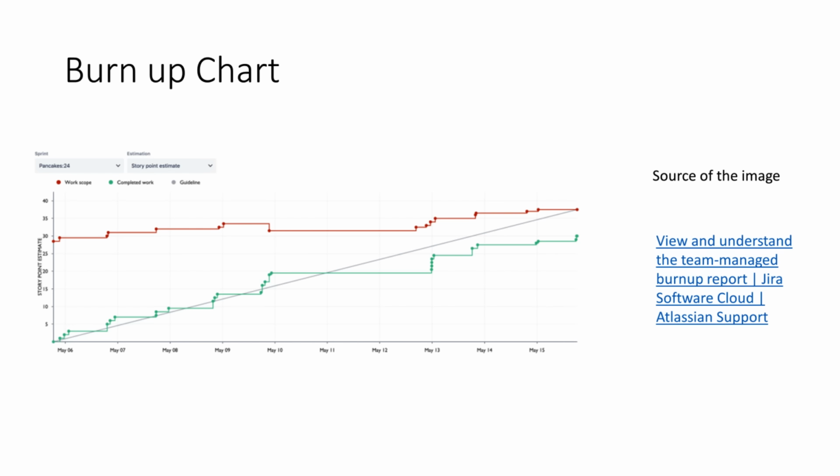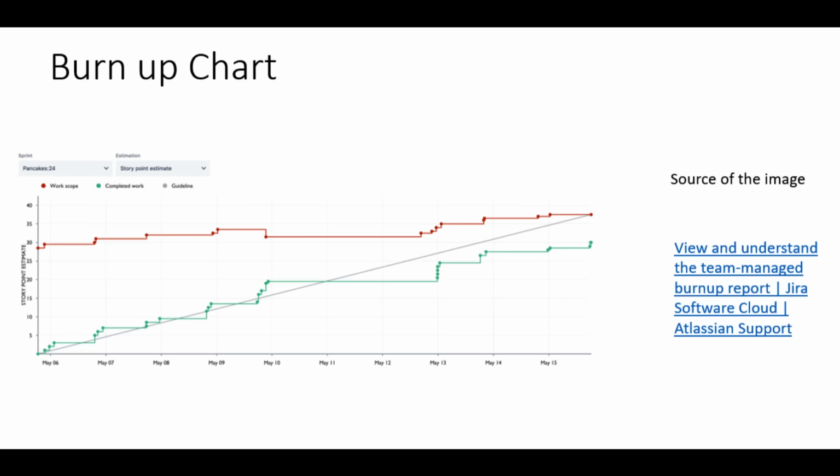Burn-up chart. Burn-up chart shows the amount of work which has been completed. Time is shown on the horizontal axis and work completed on the vertical axis. As time progresses and items are drawn from the backlog and completed, a plot line showing the work done may be expected to rise. The amount of work may be assessed in any of several ways, such as user story points or task hours. The amount of work considered to be in scope may also be plotted as a line. The burn-up can be expected to approach this line as work is completed.